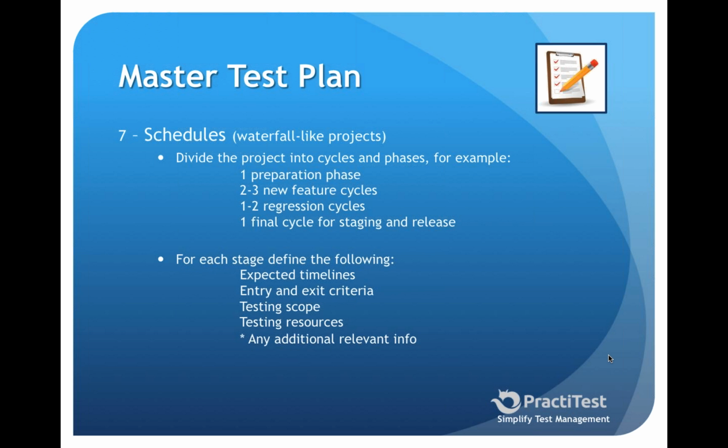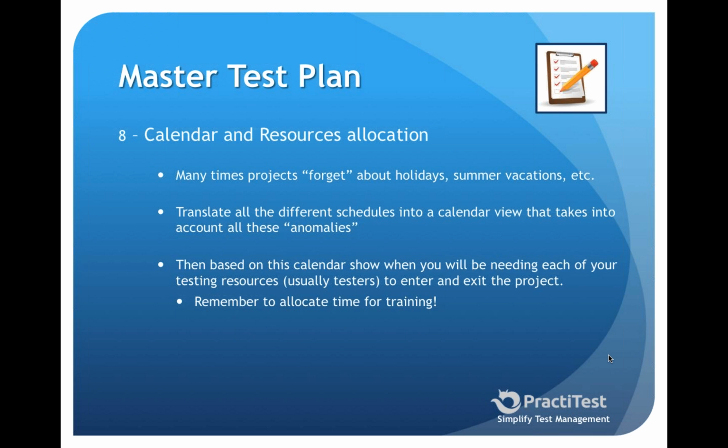And obviously your testing resources in there. Now, once you have that schedule, it doesn't end in there. You need to go ahead and translate that schedule on a high level to what I call a calendar and resource allocation schedule. And again, it's very funny, but I love it when in many projects people forget, quote unquote, about holidays or summer vacations.